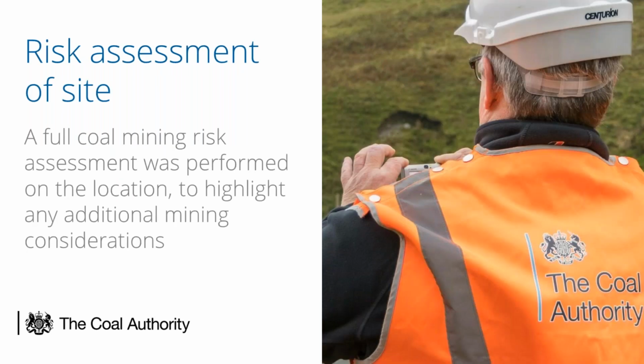So one of the first things we did was get the mining risk assessment done by our in-house teams. That flagged up a few things on the site. Obviously, we knew there was some mining there with all the issues we'd had in the past, and there was an outcrop midway across the site, shallow workings. The report identified the issues on the site and enabled us to pinpoint the investigations a bit better.